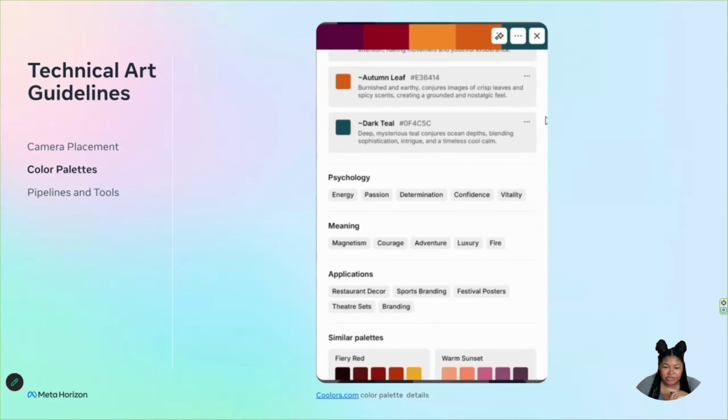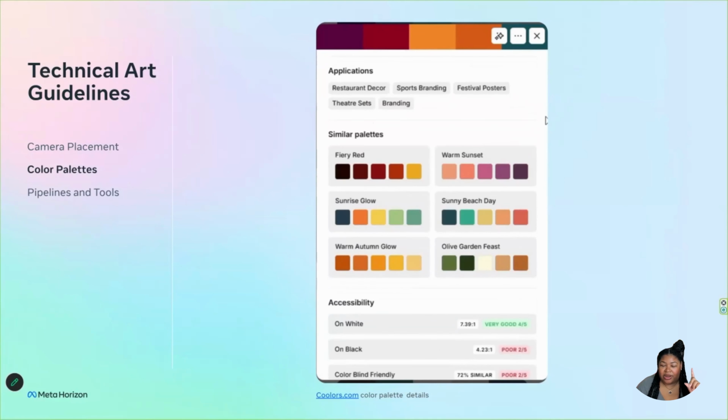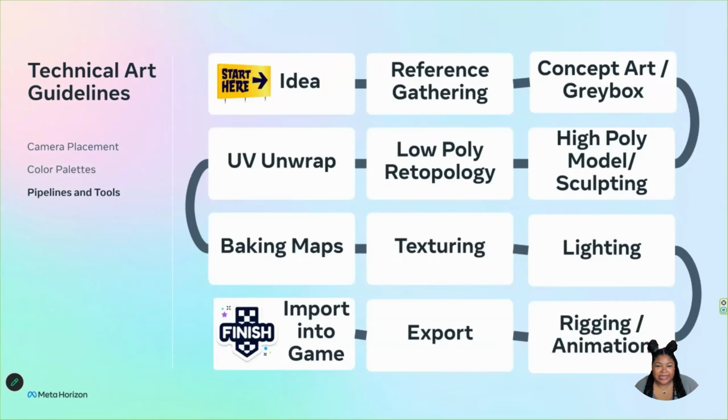You go ahead and you start to define your pipeline. So your pipeline is basically how you get your asset from concept to game ready. And this could include any checkpoints, which are not super obvious in this image, but sometimes you have to have review and approval before you actually move on to the next step of creation. I would consider those kind of like bottlenecks. And there are also going to be dependencies, like you can't build one thing before this other thing has been locked in design-wise. So you want to make sure you're paying attention to those things, write them out, and plan for them.